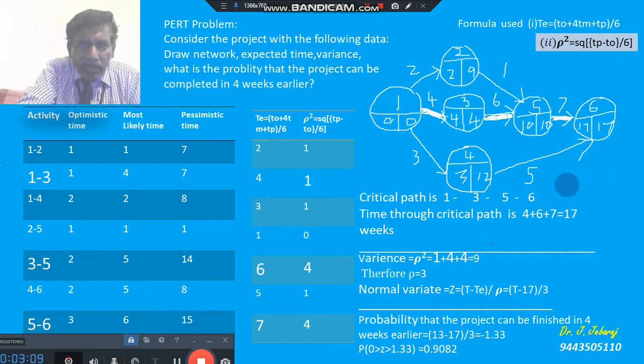Okay, now look at this, the particular condition is satisfied here, therefore this is the project network for the given problem. Now each event I am dividing equally into upper half and lower half. In the upper half I am writing the event label 1, 2, 3, 4, 5, 6 like that, and the lower half I am dividing into 2.